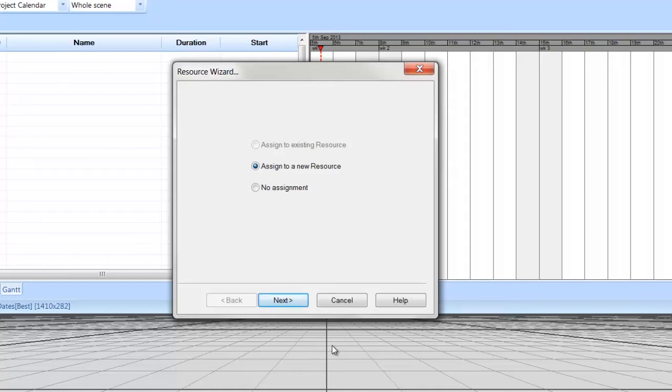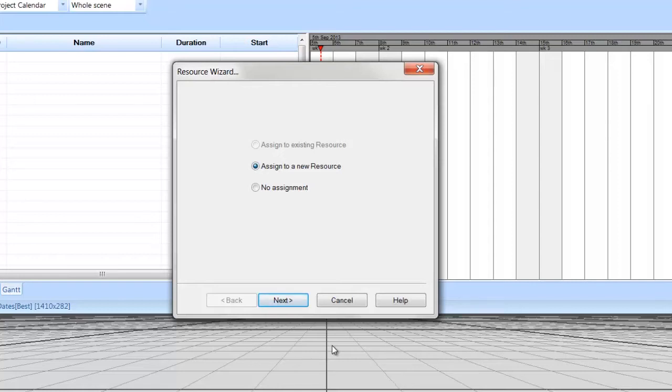Resources are anything used by a project schedule, which are identified by four types: human, equipment, material, and location. Select Assign to a new resource, which will automatically create new resources within the Synchro project to represent the 3D elements. Then select Next.